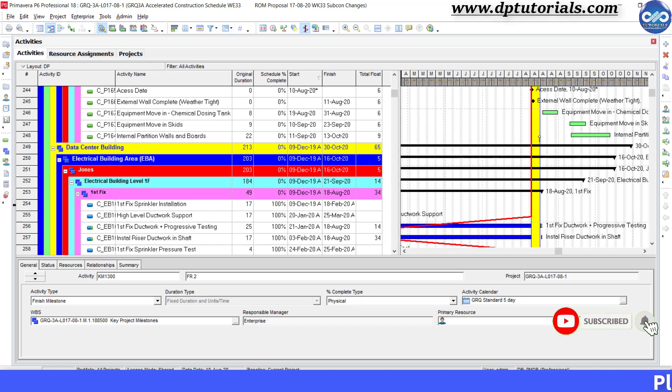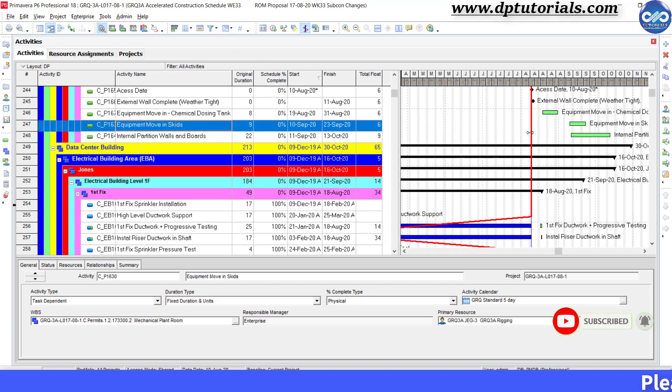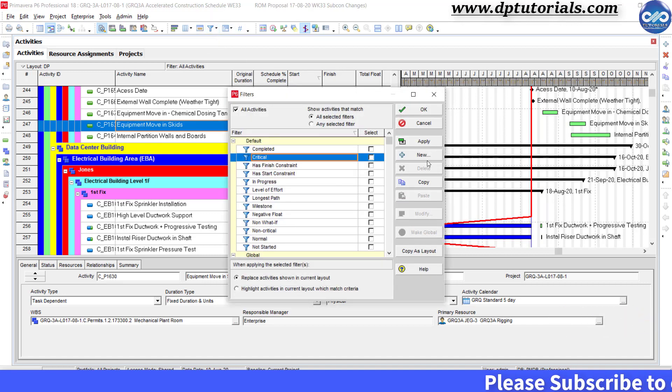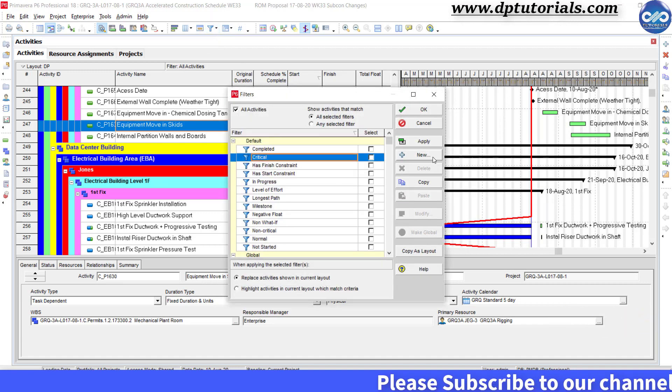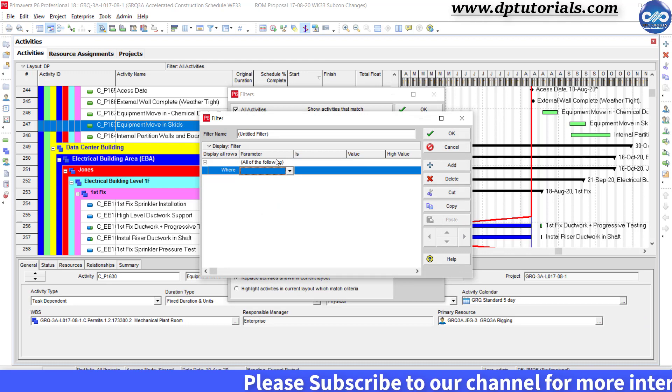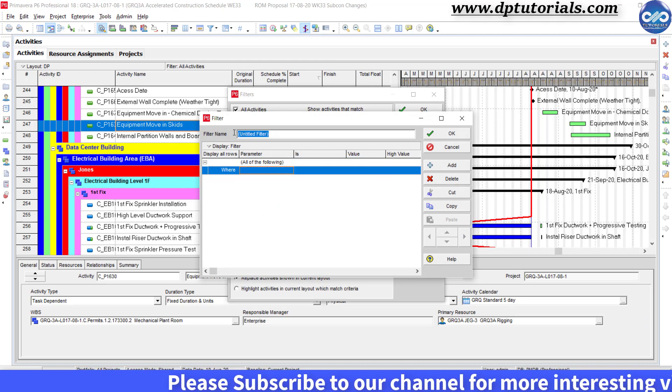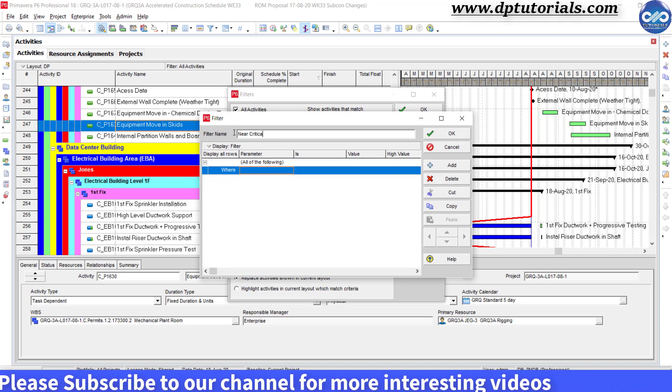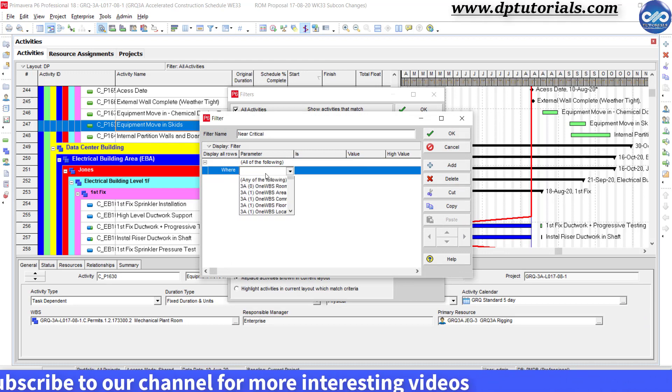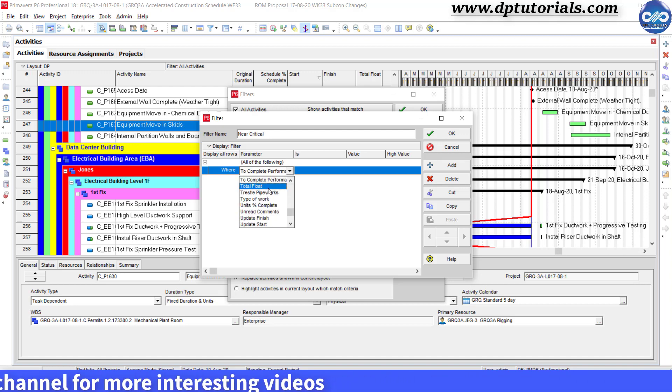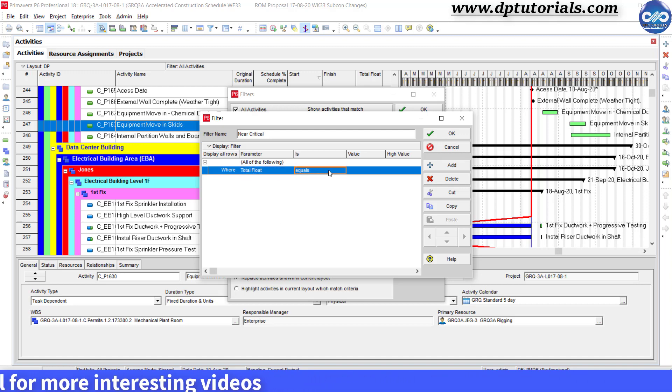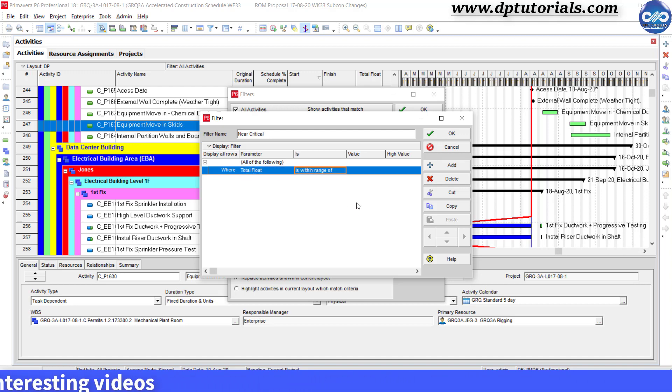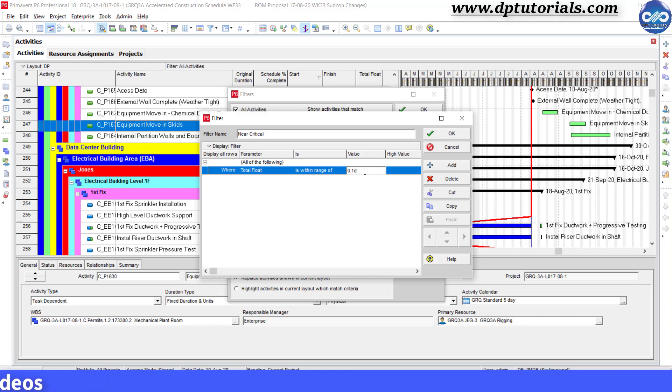First, open the filters dialog box by clicking this icon and click on new button to add a new filter. Give name as near critical and condition as total float is within the range of 0.1 days to 10 days. Click OK.